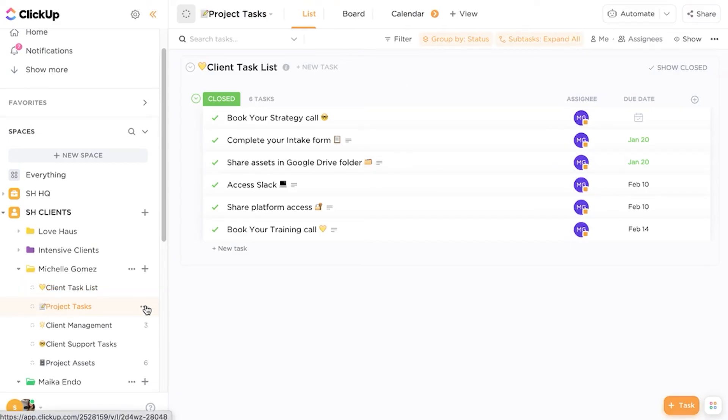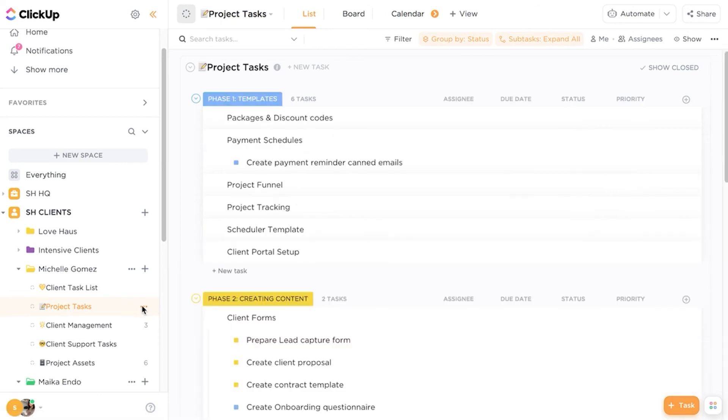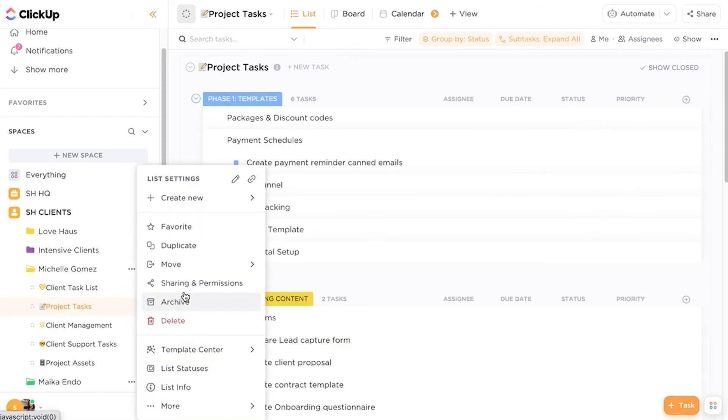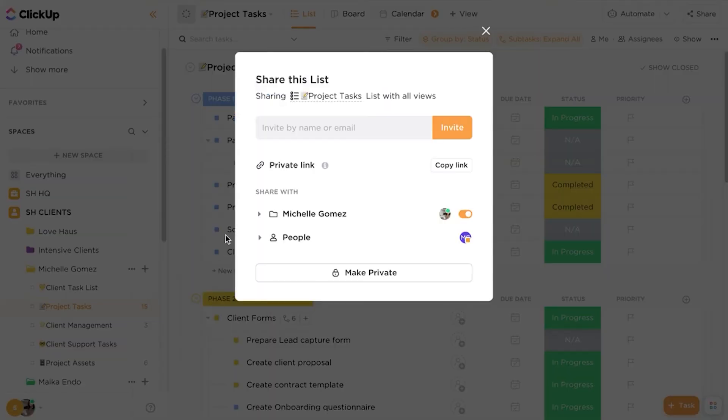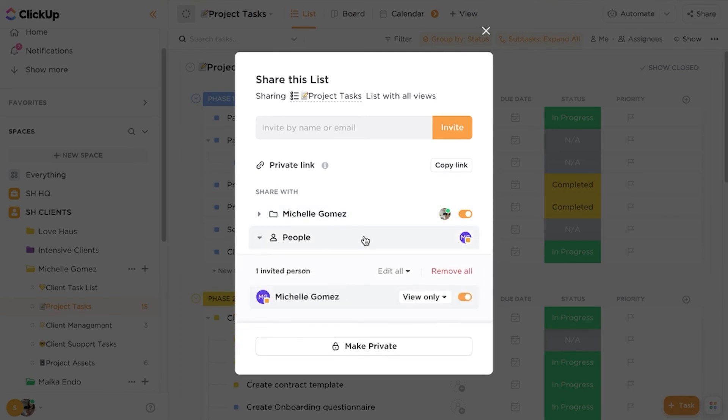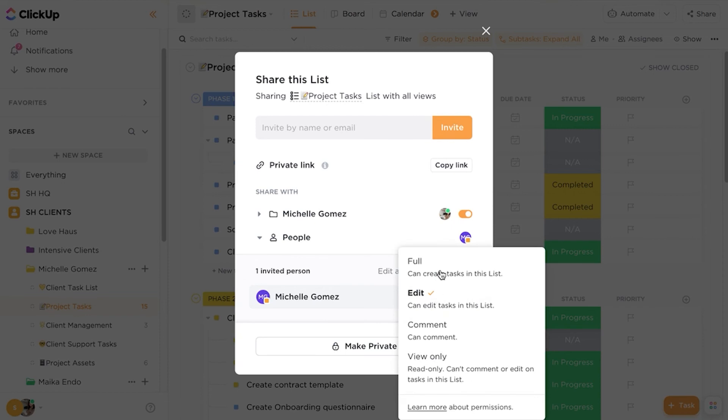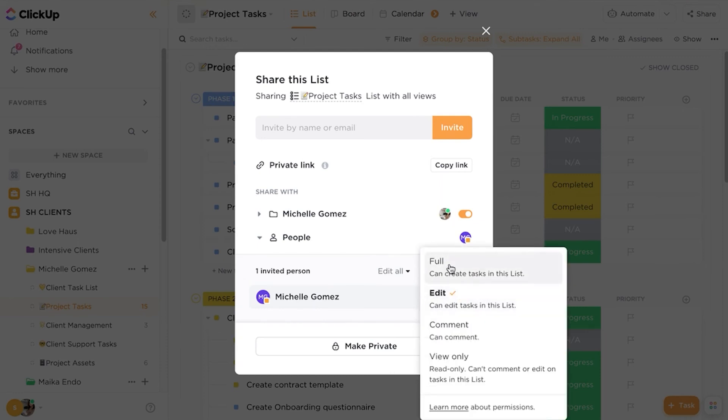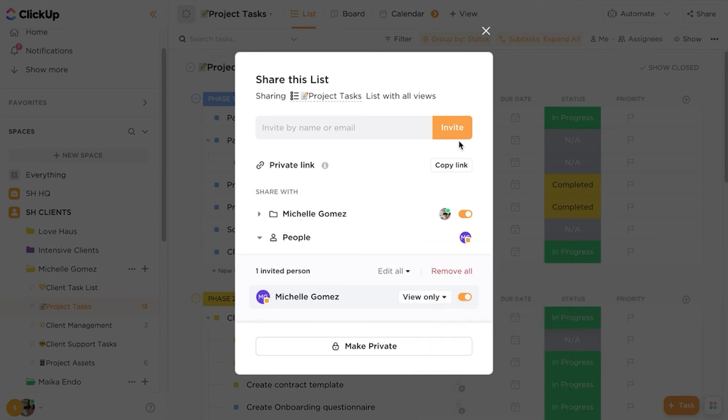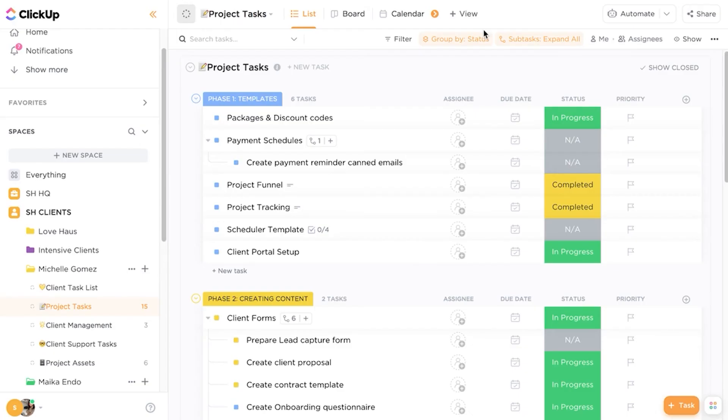However, if we go over to the project task list, this is really for myself, my team to do the work. So we click on sharing and permissions. What you'll notice is that there are different permissions in this task list. So actually, the client only has view only permission. So you get different stages of permissions. And it just means that clients can view only, they can't comment, they can't make edits in this particular list unless I change it. And if they have full access, they can do anything, they could edit if they have edit, or they can have comment only access. But in this instance, I only want clients to have view only access, so that we can do the project without the clients jumping in and playing around with anything in this task list. So that's another way where ClickUp really helps us to manage our clients and our client projects inside of the folders in the task list.